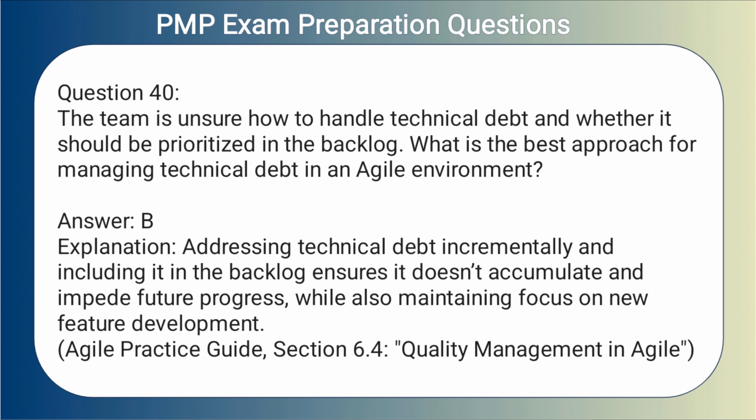Answer: B. Explanation. Addressing technical debt incrementally and including it in the backlog ensures it doesn't accumulate and impede future progress, while also maintaining focus on new feature development.